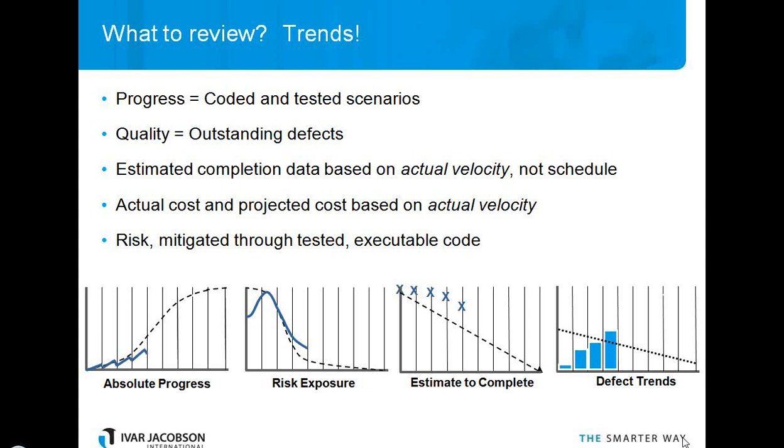We should see that curve start off. It might climb as you identify new risks once you get into the project, and then you'd like to have it drop off pretty steeply to get more certainty about the work later in the project. So here on the curve, it's starting to flatten out sooner than you'd really like it to. So it suggests that there might be some problems the team's having in mitigating the risk.